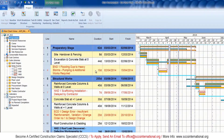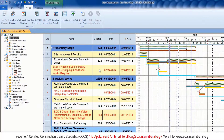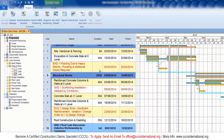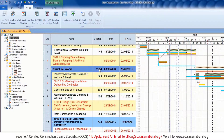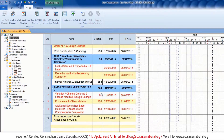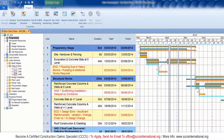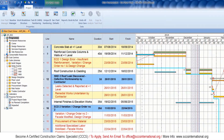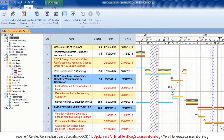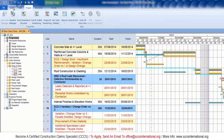Now we'll carry out one last step, and it's generally good practice to do this after any delay analysis. This is a check to ensure that the delay events have been properly and logically embedded into the main program. What you could do is go back and make all the durations for the delay events equal to zero and see if the completion date ties up with the original completion date — just a cross-check to make sure the program was properly embedded with the delay events.